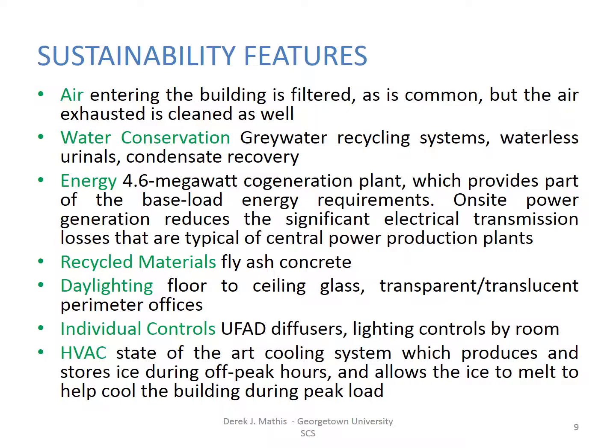Touching on the recycled materials, in order to minimize the impact of new construction, it's vital to use materials that decrease the net life cycle cost of the project, including material that comes in and the waste that goes out. One Bryant Park managed to surpass its goal of recycling 75% of its construction waste to end up at 83%. Additionally, with materials such as concrete with blast furnace slag and 60% recycled steel, the building contains 35% recycled content, which is pretty impressive.